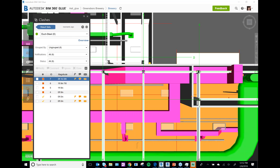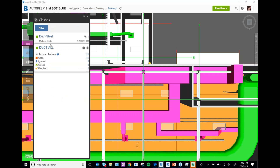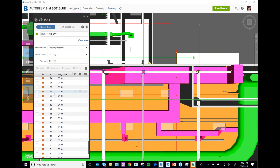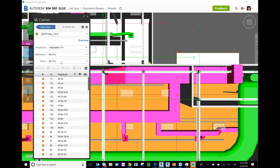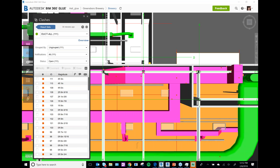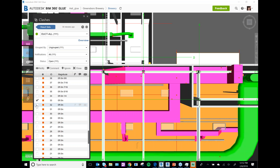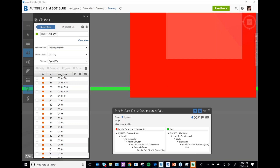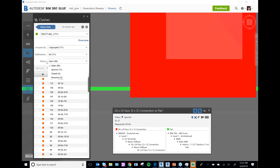My last Glue tip is around clash reporting. People just run the clash and review it, but one of the more powerful things you can do is sort and group things by status. If you just want to see open items you can do that. I can select some zero-inch clashes and hit Ignore — now they're not showing up. If I just have Open status on, I'm only going to see items that are currently relevant.